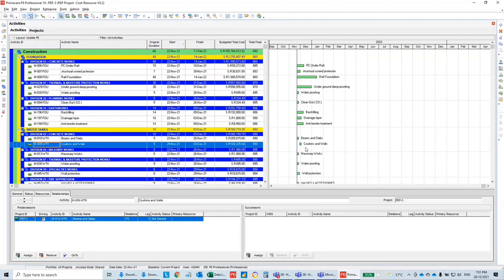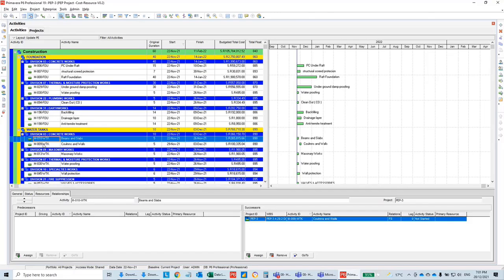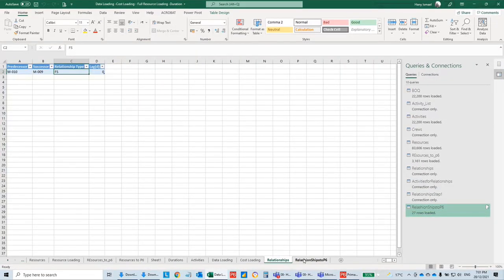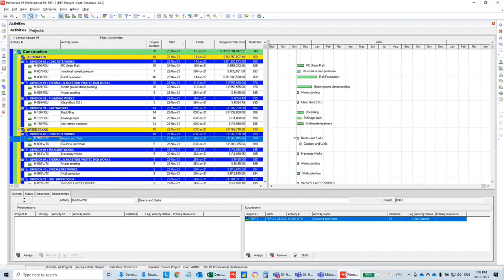This one was removed. Now you can see that we mixed up the columns, by the way. We need to change them because we put here 10 and 9. We need 10 to be filled, then 9. What we have here is the opposite, because the columns come after the beams, as you can see here. The activity before the beams is the columns. Yeah, it is correct.